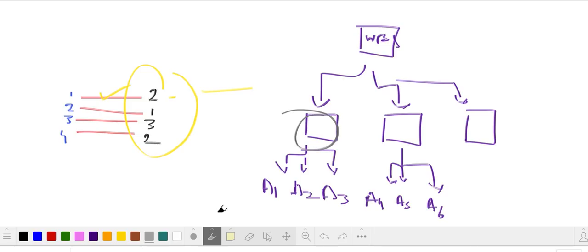The reason is this, because in a project there has to be a WBS, which we have discussed in the scope chapter, and it has to be estimated. If you're not estimating, it means we're not doing that activity. And all activities, whatever is in the WBS, we have to do anyhow to complete the project. And if we missed something while we were making this WBS, it means that activity has been missed, and now it's not a part of our project right now, but eventually we were supposed to do it. And I'm going to tell you how we're going to deal with it.